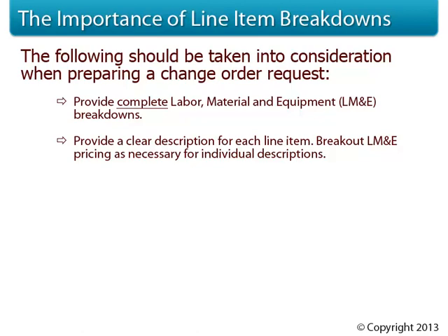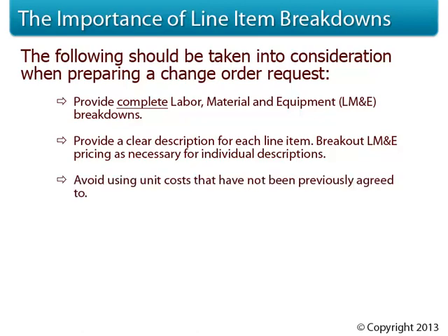Of course, we already discussed the descriptions for the cover sheet, but we also need to be sure that the general contractor, construction manager, and especially the owner all fully understand each individual line item. Avoid using unit costs that have not been previously agreed to. Of course, if unit costs were provided with a sub's bid, agreed to, and incorporated into the subcontract agreement, by all means use them, as they've clearly already been agreed to.